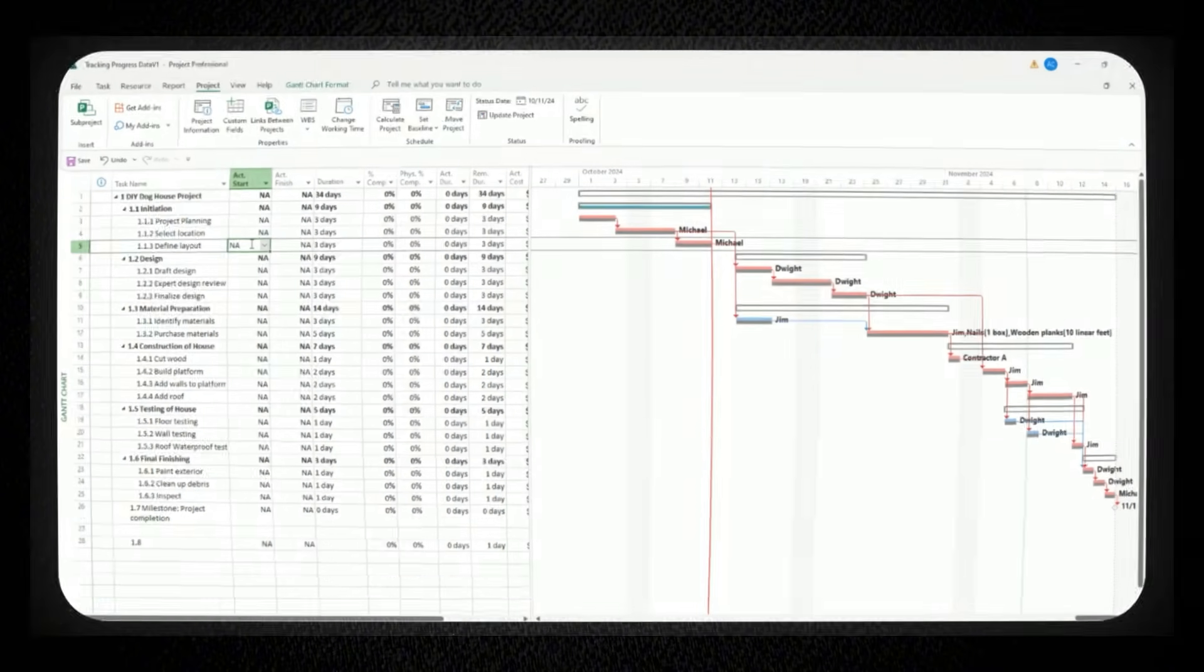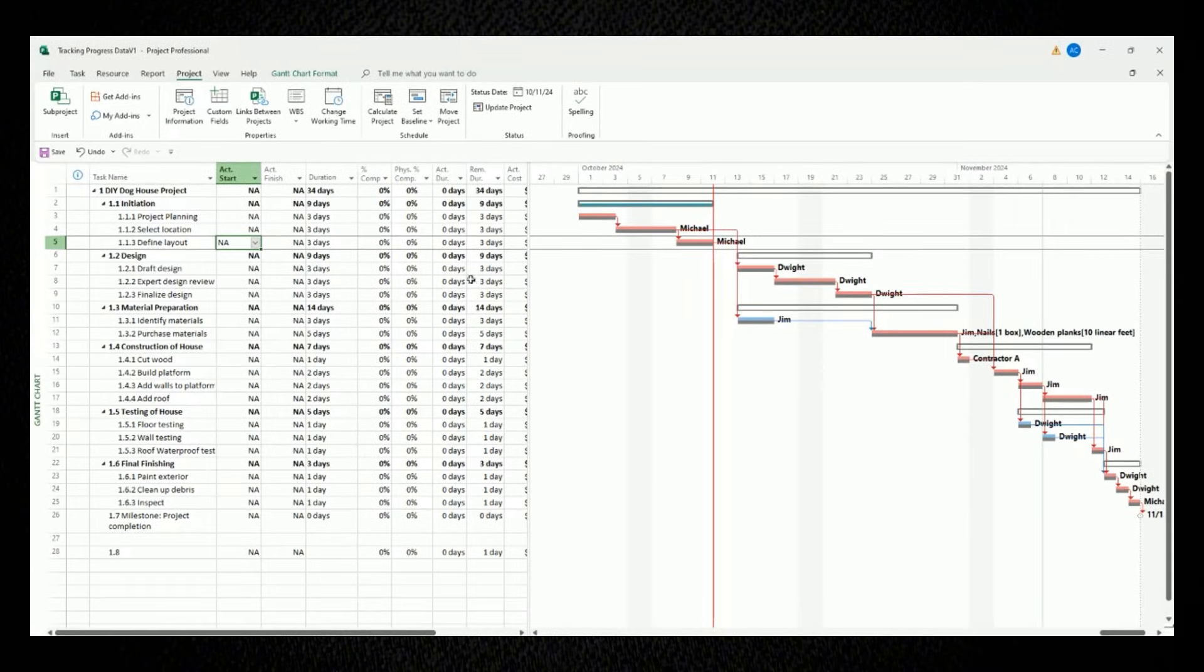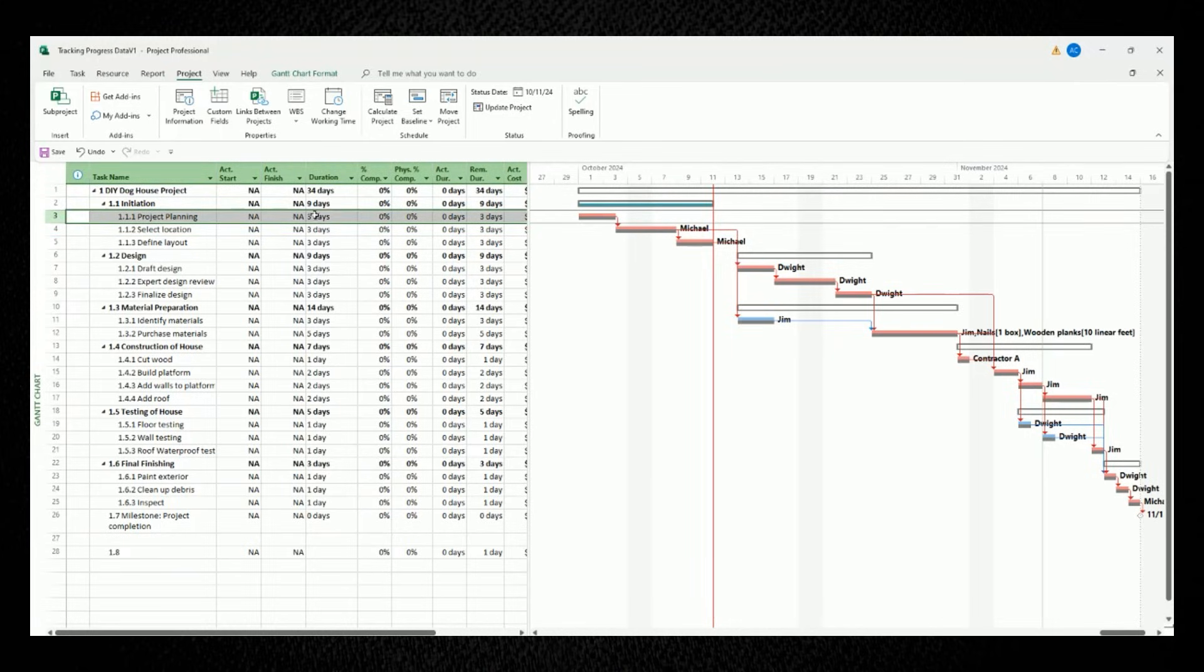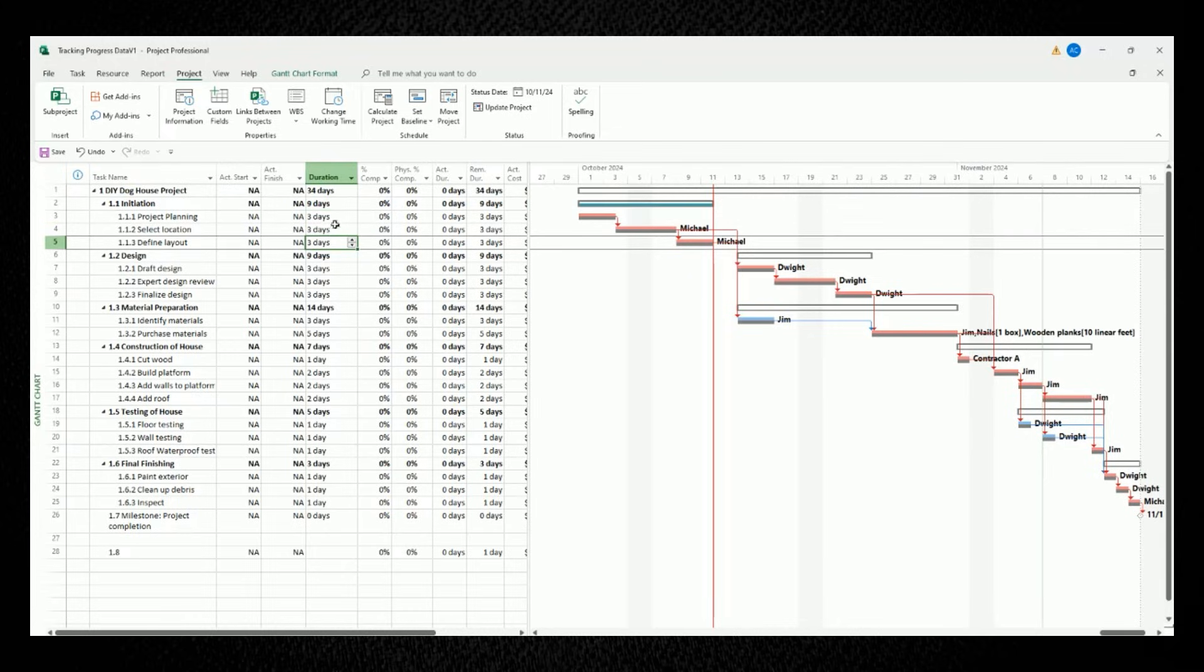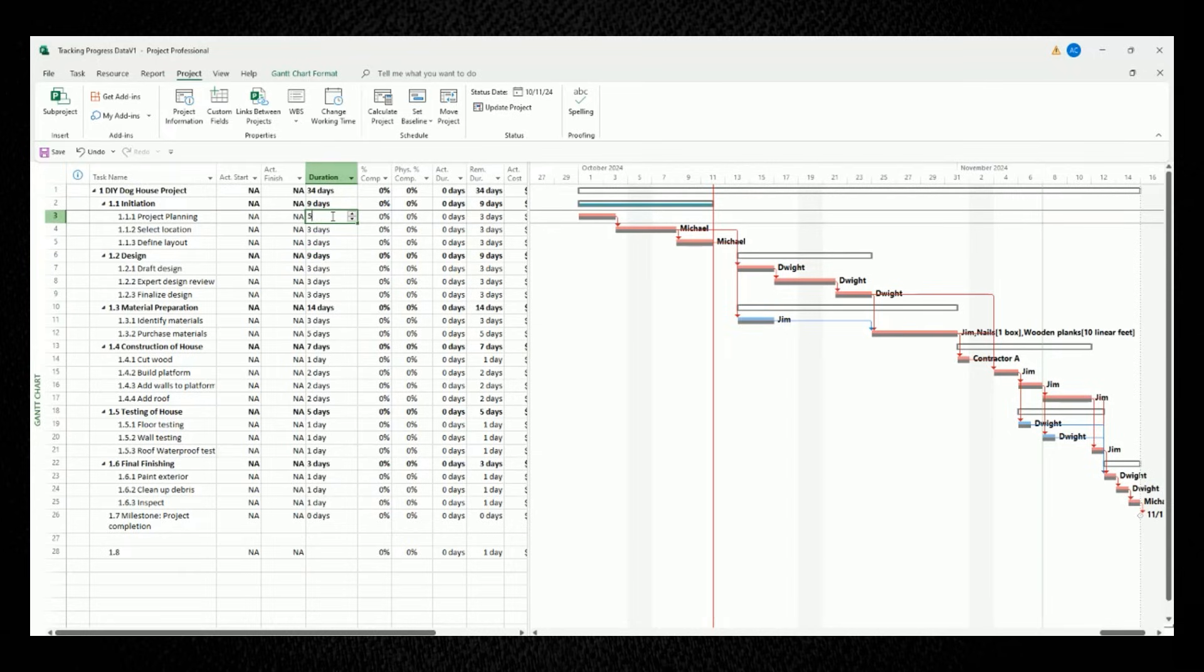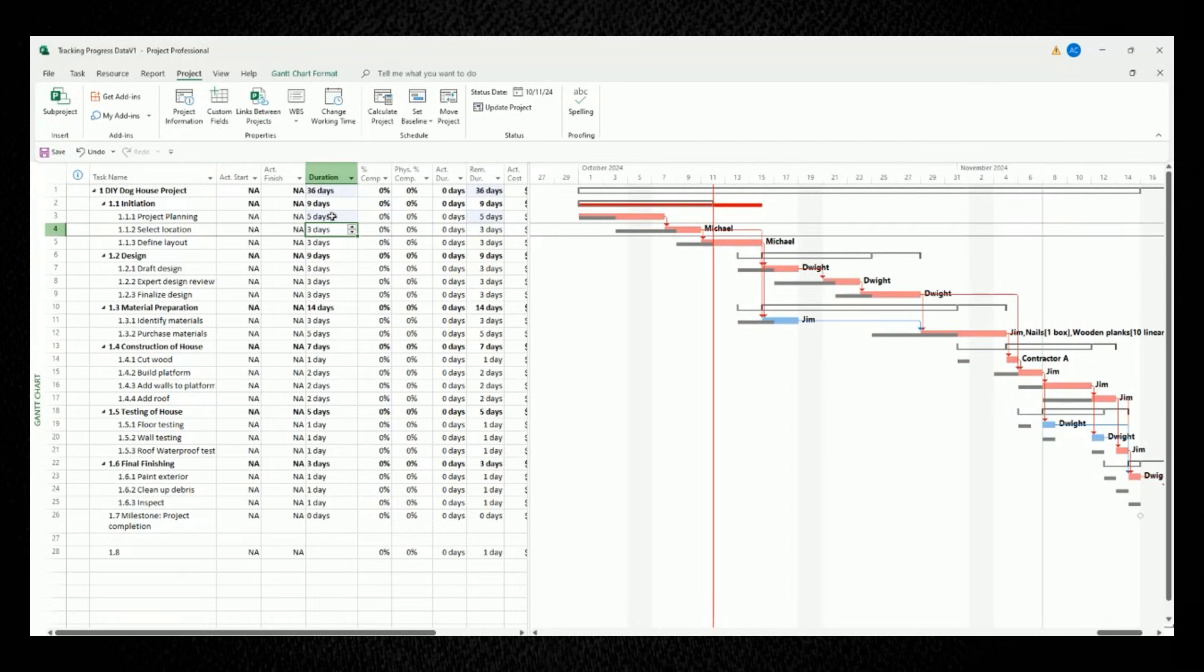As I mentioned earlier, looking at our Gantt chart, we will update all the tasks that lead up to this red line. So for our first task with project planning, let's say that it took longer than our planned duration of three days. Instead of three days, let's say it took a full five days. So we'll change the duration from three days to five days.